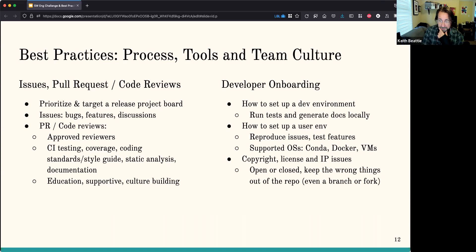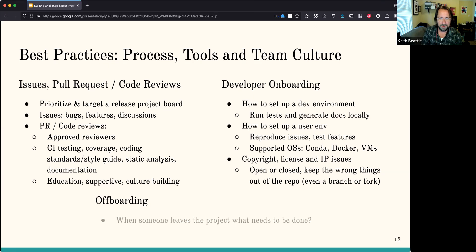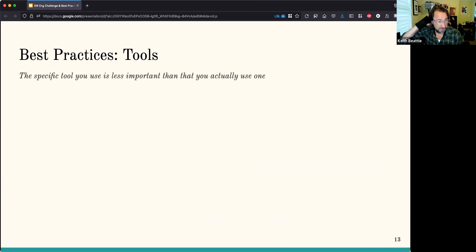We tried one approach, realized it wasn't working, so we revamped and incorporated that into our developer onboarding process — that each individual developer, if working under an NDA, needs to be responsible and communicate with other people about how that data is going to be protected. Offboarding is another important thing to think about: when someone leaves a project, what needs to be done? Permissions that need to be changed, ownership handed off.